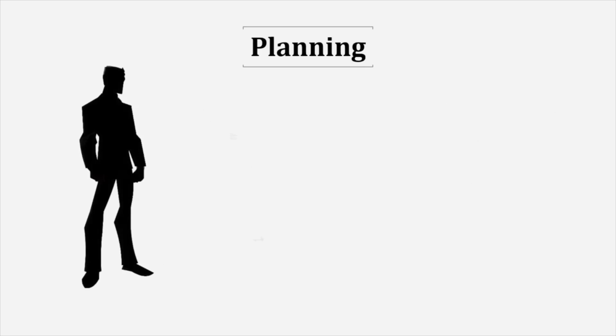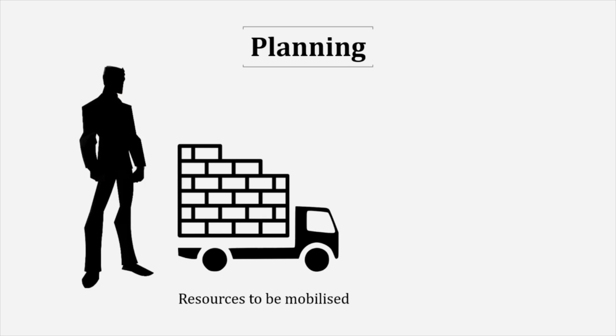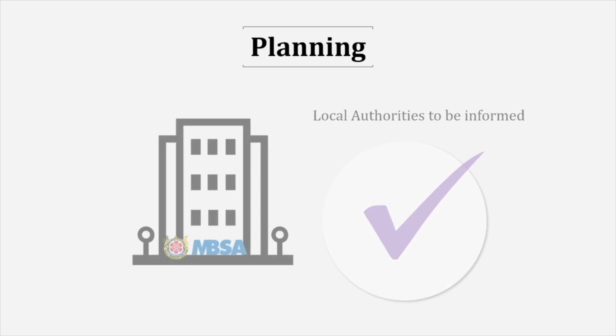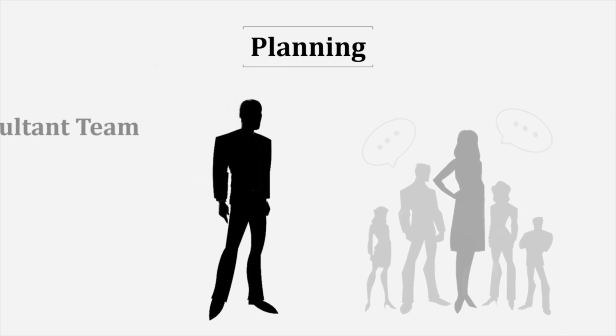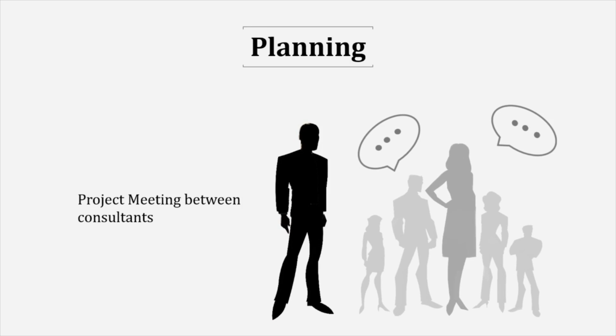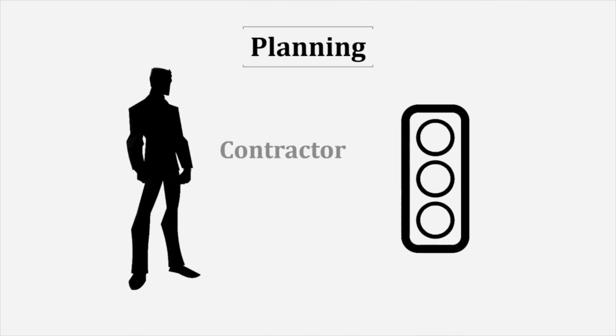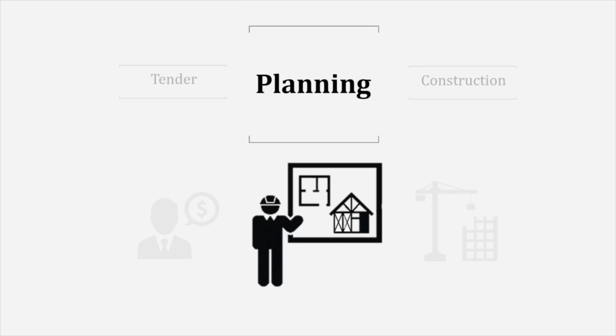Resources will be mobilized and then brought over to the site for construction. Then, local authorities will be informed. Finally, the architect will lead project meetings to discuss and create an understanding between consultants and contractor. Once that's settled, the green light is given for the contractor to commence work. Next, the construction phase begins.